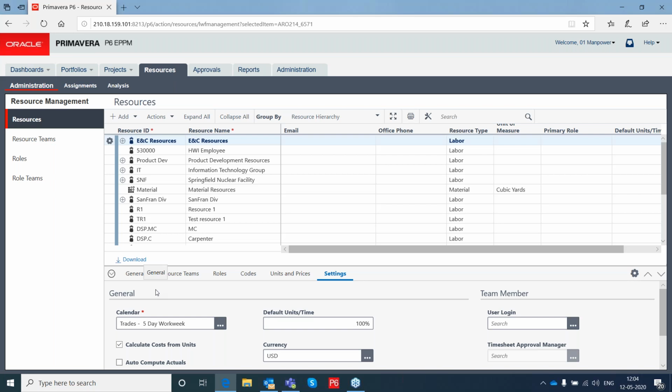Okay, what are the types of rate you speak about? Okay, rate types. There are 5 rate types. You can define it based on your requirement. That is, the nomenclature of that rate type can be defined as per your requirement, like internal rate, external rate, contractor A rate, contractor B rate. That kind of name you can give it, and you can use it in your resource rates.